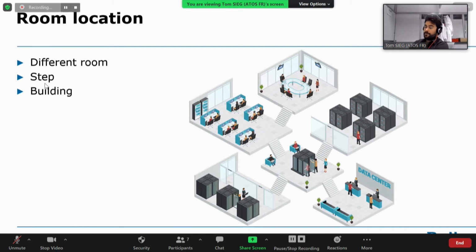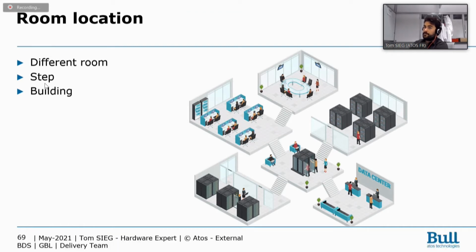First of all, the steps. If you have too many steps to access your data center, it will be difficult during the installation and during the maintenance, because you will have to carry a lot of big and heavy pieces between different stairs, for sure during the installation. So avoid having too many steps between the data center and the maintenance room or storage room.